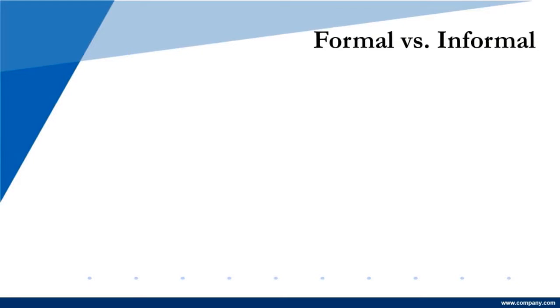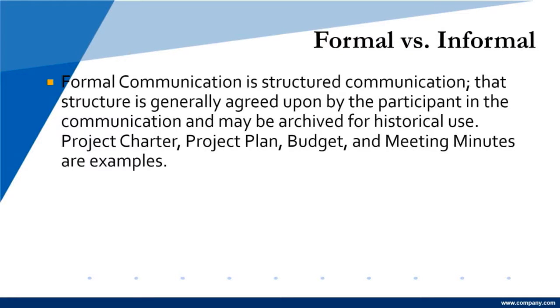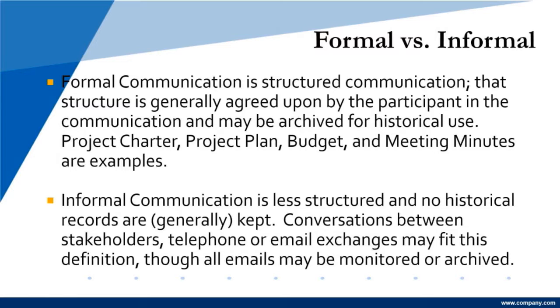If a conversation between two parties becomes mission critical, a formalized communication should be created. For instance, if you're discussing an issue over text and someone says we should escalate to the boss, then an email of the escalation is the formal communication. Formal communications are structured, agreed upon, and have historical use — examples are the charter, project plan, budget, and meeting minutes. Informal are less structured with no historical records generally kept. Remember all your communications may be monitored and recorded, so your standard of conduct should be appropriate at all times.